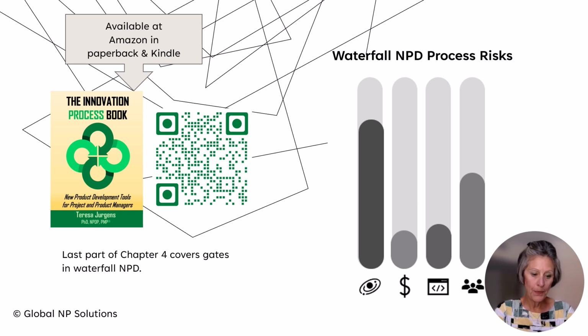Go decision. A go decision authorizes the project leader to invest the approved resources to advance the development of the new product project through the next stage. Gatekeepers authorize expenditures and agree to a set of deliverables for the project in the next stage. The go decision validates that the new product concept meets strategic, marketing, technical, and financial objectives.